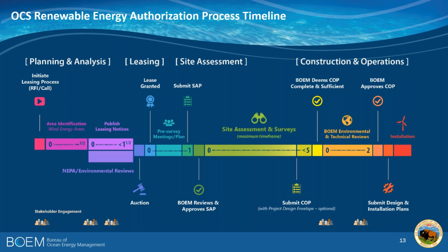But the important point in this is the ability for stakeholder engagement throughout the process at every step of the way, from area ID in the planning and analysis phase, all the way to approval of the construction and operations plan, which is subject to an environmental impact statement under the National Environmental Policy Act.